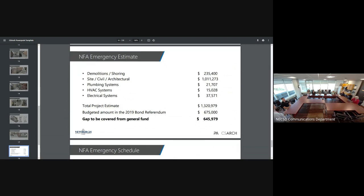We know that the bigger things are the railing systems, so we're gonna wanna get those absolutely right away. And the storefront systems. Well, we can put in temporary doors in storefront, right? That's not the worry. The worry is gonna be the railing system. So we're gonna jump on them with shop drawings immediately, because those gotta be figured out.